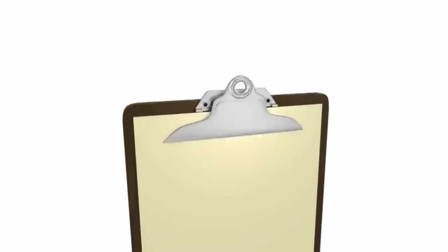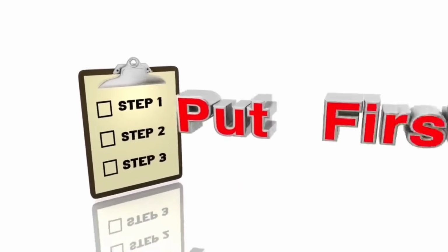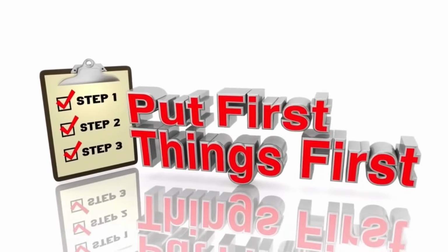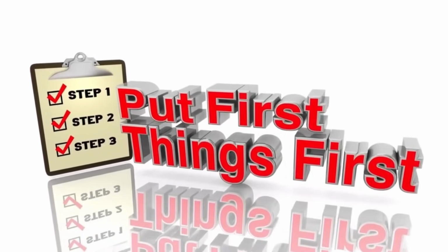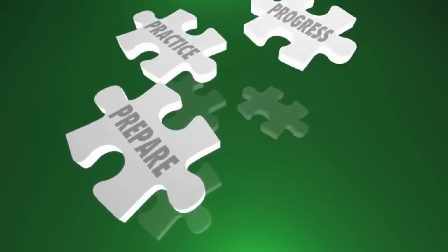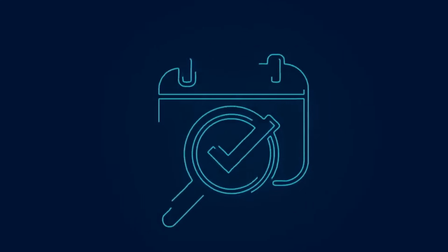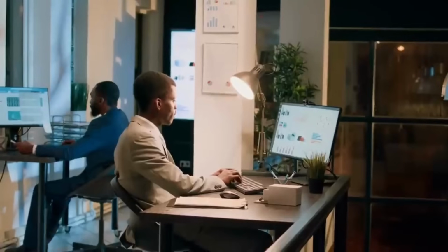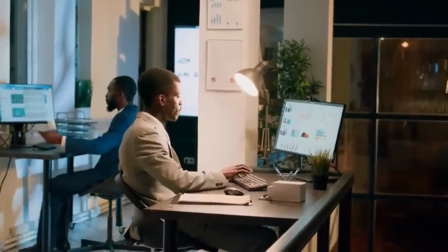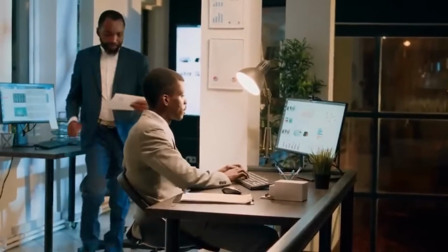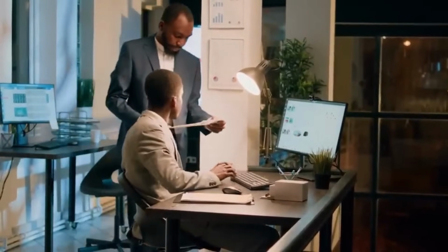To create the first draft of your product roadmap, follow these steps. Rough sequencing and prioritization: prioritize your milestones based on their value in supporting the product strategy. Understand the rationale for each milestone and prioritize them accordingly. Scheduling: use your prioritized list to schedule milestones into your roadmap. You can start with a basic approach, scheduling one milestone after another based on effort estimates and team capacity.